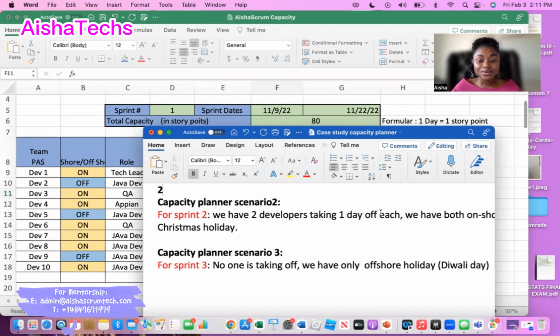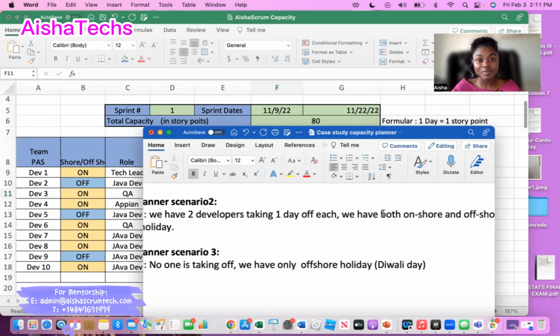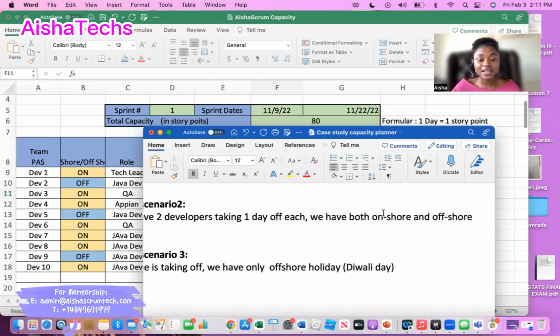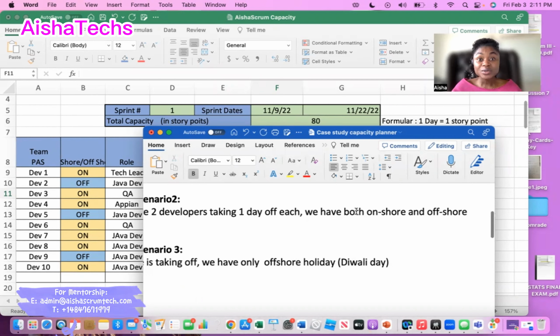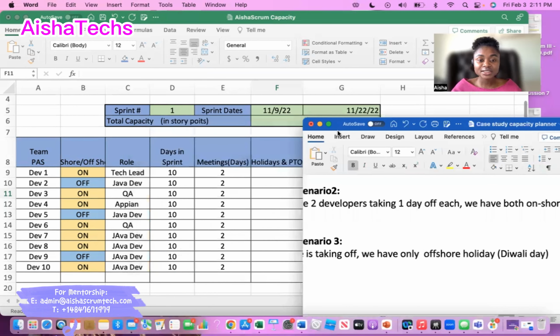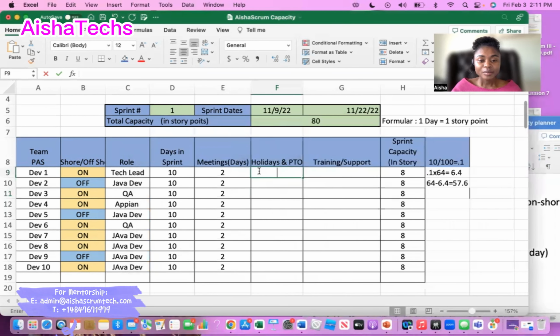I will always start by taking the holiday. For me, it makes it easy because in this case, we do not only have off for people in the United States, we also have off for people in Europe and all over that are part of my team. So I'm going to take out 1 day off for everyone. I go directly to my Excel spreadsheet and put 1 for everyone that's having the Christmas day off, because the company usually is shut down and closed during that time.